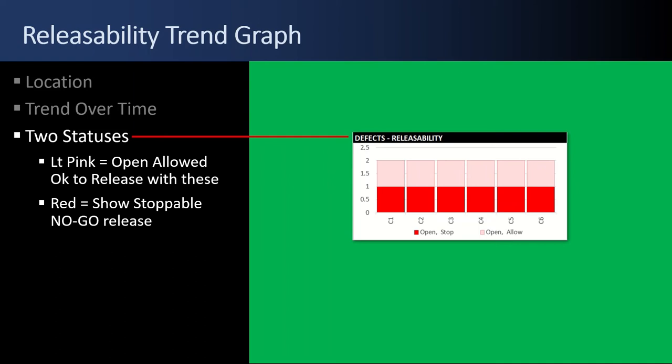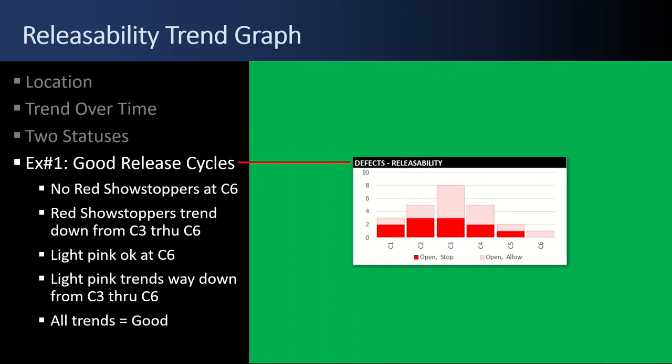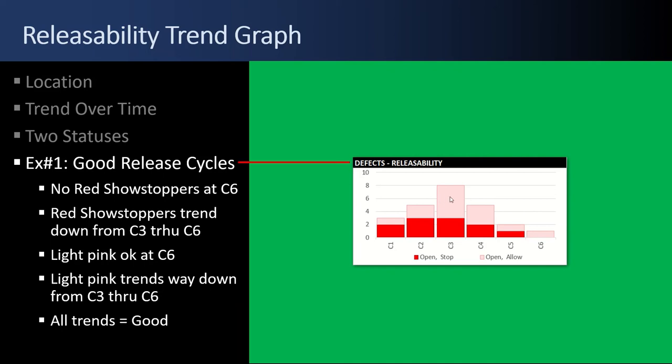Example number one, this is a good release cycle. There's no bright red showstoppers at C6. So by test cycle C6, good to go. The red showstopper trend goes up. That's normal. And it tapers off and goes down. That's good. The light pink goes up, the allowable defects, and it tapers off and goes almost to nothing. All those trends are good. That's the way we want to see it.